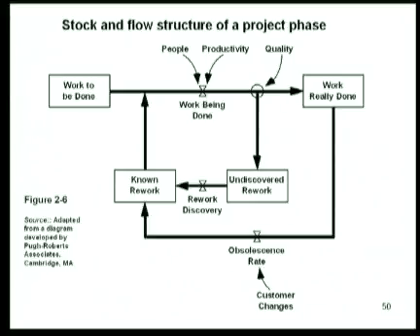money today. Well, both contracts were awarded as total package procurement projects with a firm fixed-price contract structure in which Ingalls was provided only with the performance specifications and was thereafter solely responsible for all system design, detail design, material procurement, planning, testing, and construction. Both programs involved innovative and technically sophisticated new designs. That's critical here. The fact that you had to stay state-of-the-art technically was essentially one of the drivers in causing the overage here.